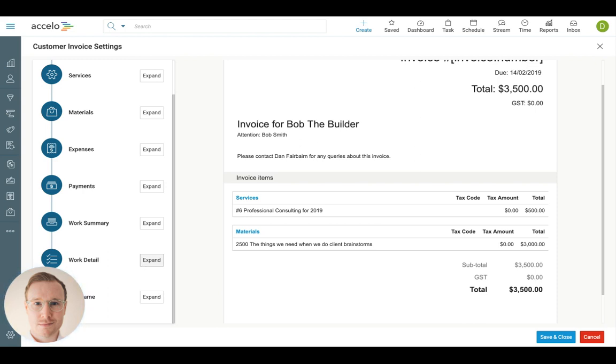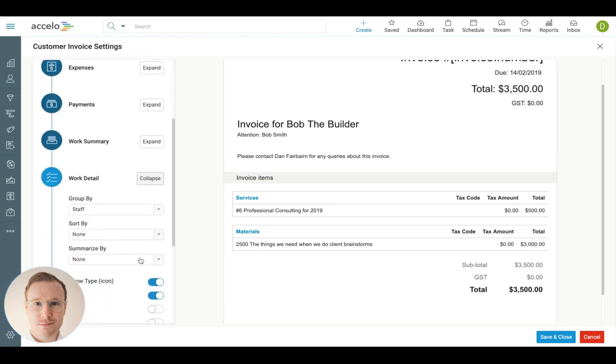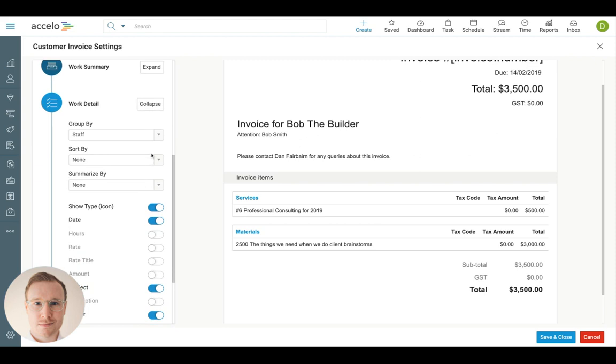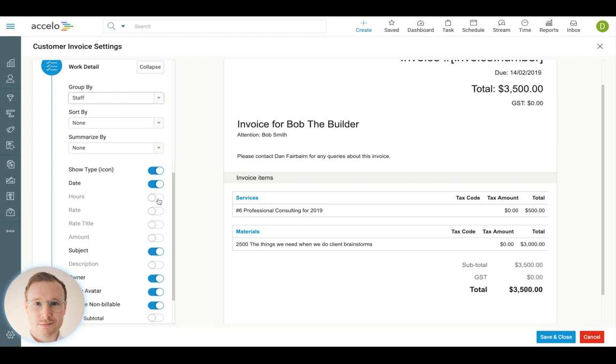Now, these are essentially great resources for when you're billing under work done or actual time, as you can actually show a complete history and breakdown of all the actual work that creates those particular figures you're charging for, giving them a breakdown of things by the staff members, by object, showing how many hours, showing rate, showing the subject, and even description, showing everything you want, as little or as much as you need, to make sure that your clients feel confident that when you're billing for actuals, you're billing for the correct time and work that's been rendered.